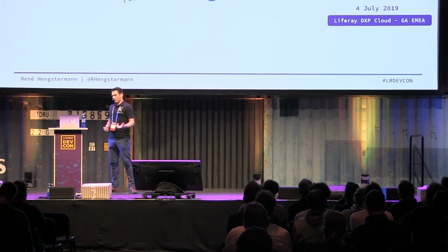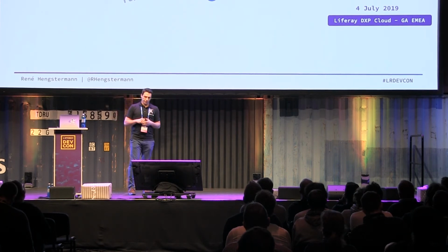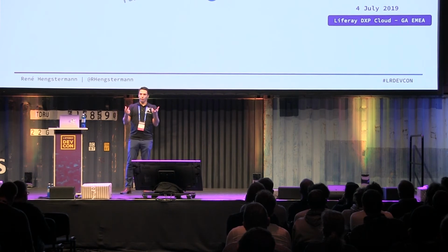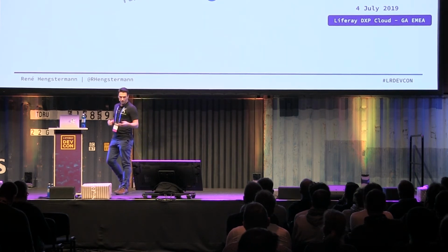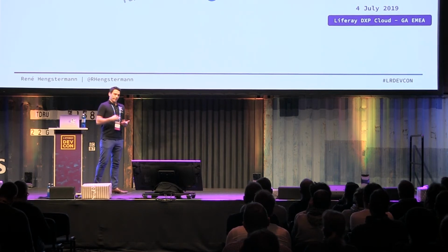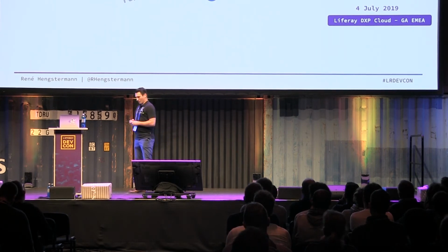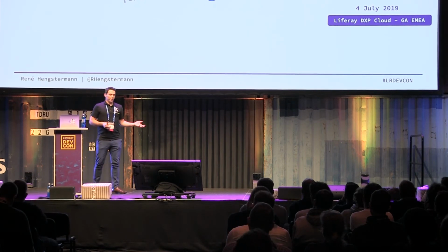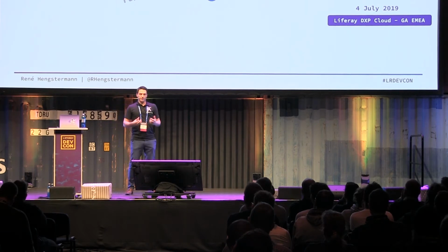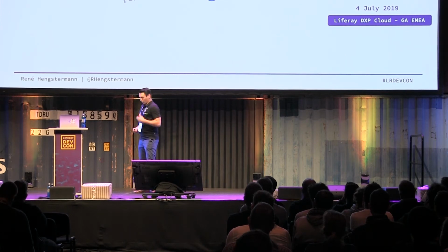At the beginning of the year, our client decided we want to have 3 major releases, because we're moving away from the platform stage. We're now looking at the product more like an office suite, for example, where you can buy certain functionalities and use them in the platform. So we decided to integrate Liferay Commerce, build a planning tool very similar to Microsoft Project, and also, of course, still push the product forward with the core functionalities. So we again set up 3 different development teams, this time with 3 different environments, working in parallel towards those 3 release dates.